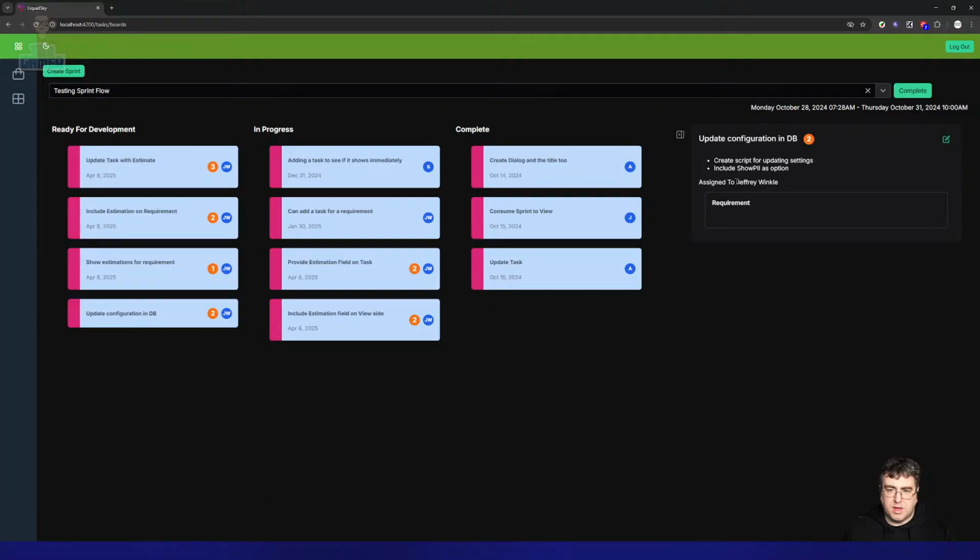Right? If you move it out of the sprint, which you right now can't do, it would report that way. If you then complete it, and let's say you take an hour to finish this and you estimated a 2, and then you take another 2 and it took 3 days, it's going to allow you to reflect back on why you thought this was so little work compared to how much work it was.